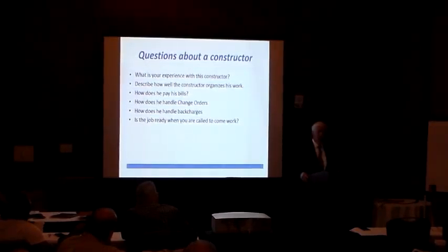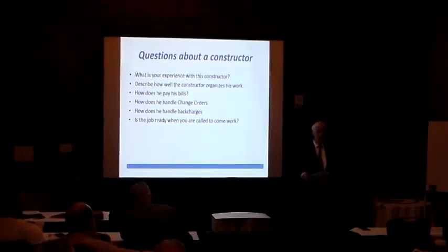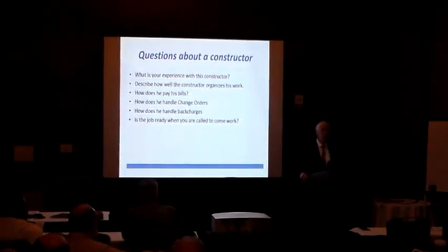Down at the bottom is, for the subcontractor, is the job ready when the general calls and says, come out here and get to work? If I'm the painter on the job, do I go out there and the job is a mess, with drop cords and junk and trash all over everywhere, and I really can't go to work and get something done? If that's my experience with a contractor, then I price that contractor according to that experience. If my experience with a subcontractor is that when his superintendent calls, the job is clean, I can come in there and I can really go to town.